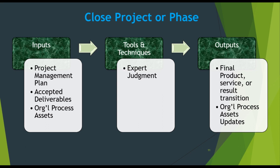Closing the project or phase — the inputs are: project management plan, accepted deliverables, organizational process assets. Tools and techniques are expert judgment. Outputs are final product, service or result transition, and organizational process assets updates.